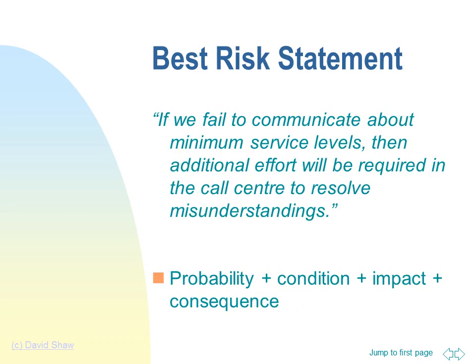Here is a good risk statement. If we fail is a probability. To communicate about service levels is a condition. Then additional effort will be required is the impact. And misunderstandings is the consequence.